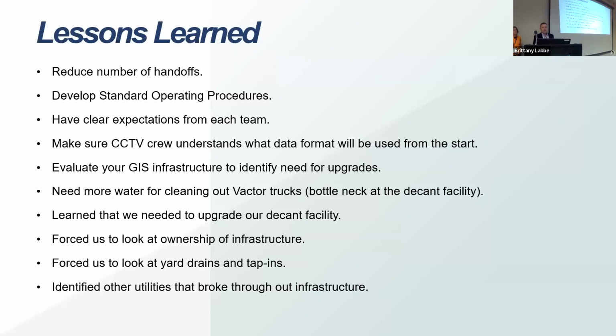So just quickly, a couple of lessons learned through the last 3 years is to reduce handoffs. Because there are all these different silos of people working on the same project, you have the manager, the city crew that does the cleaning, then you have the contractor that does the CCTV work, and then you have a contractor that does the risk assessment. So being really clear with the handoffs of when you hand off to whom, so that that person knows what they need to do. And with the Great Resignation, we also found that it's smart to have standard operating procedures.